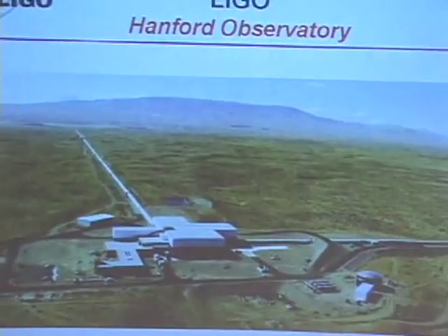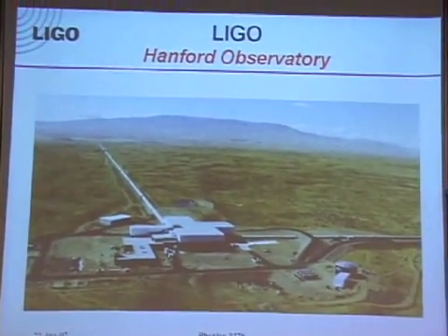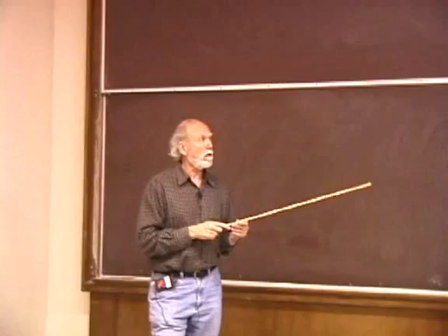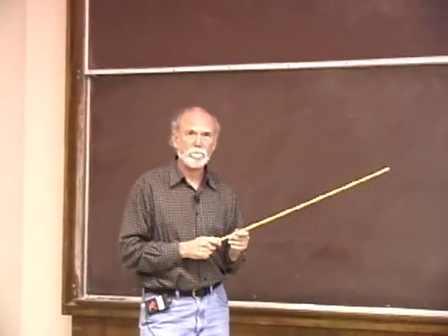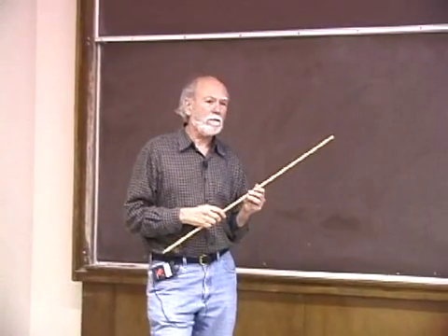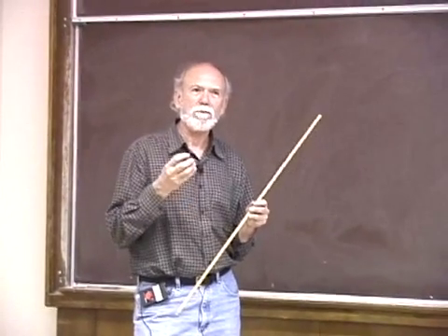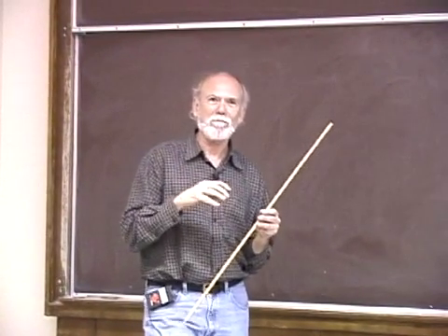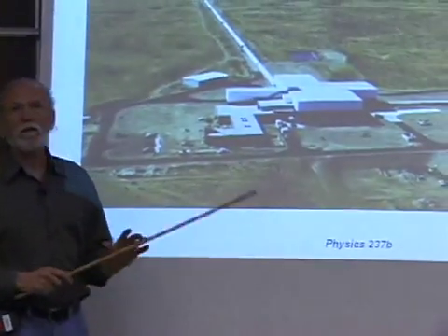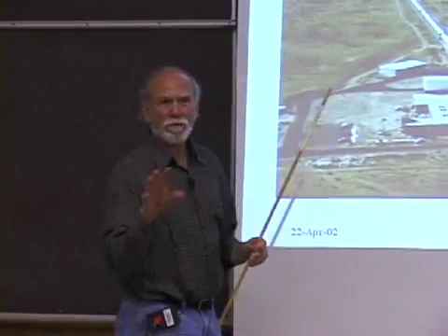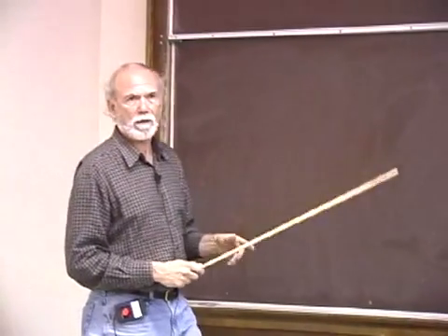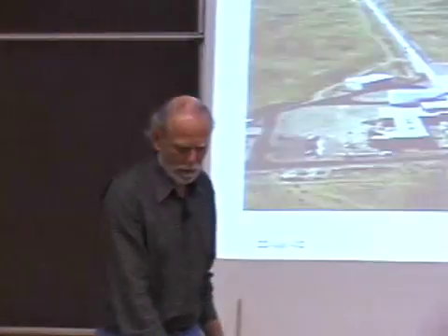Okay, so we started construction on LIGO. We got the first funding in 1994, and I showed you some graphs there where we basically did the construction and finished almost all the civil construction and spent almost all the construction money by 2000. Some of it's held back purposely, like the money for computers, because why spend a penny before you need to use the computer for something? You get better computing. So we've held that back. And a few other things, like some lab space and lab buildings that we want to tune to the last dollar. If we can have them, then we want a clean lab or this or that. But the money in the device itself has been spent, and we've got what we've got.